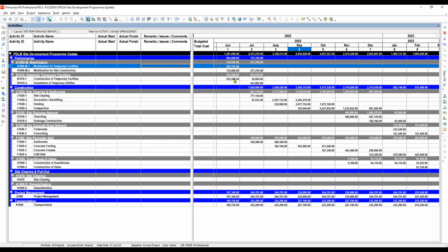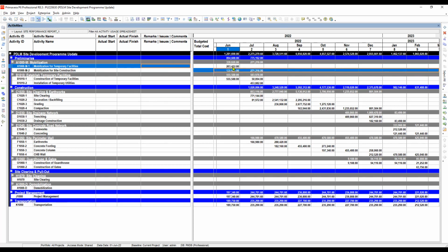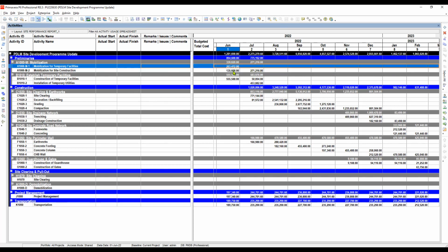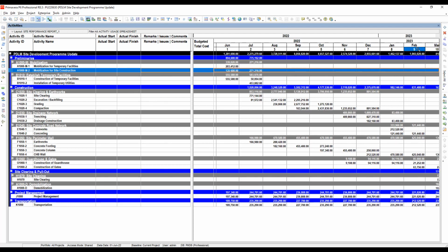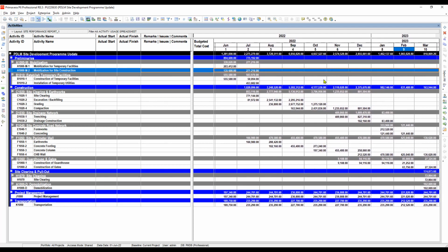So if you can see here, since we are prepared, this is only for a tracking format, so we don't need this data in here because the tracker will be the one to fill up this data, and then submit or relay it to the planner scheduler for updating the schedule or program. So we will change these parameters into the actual cost or actual units.